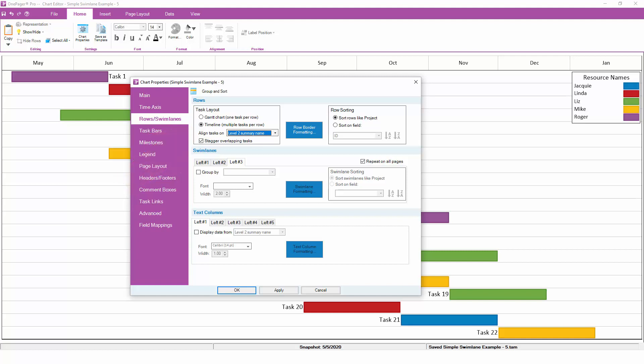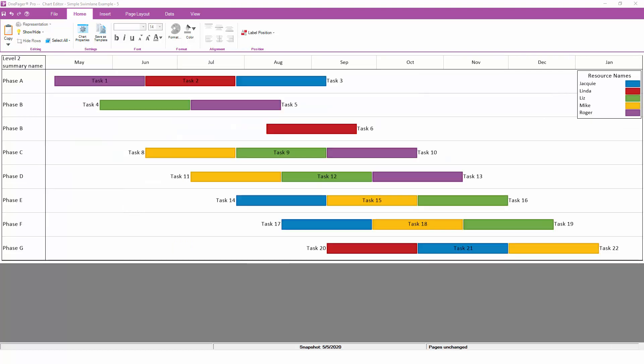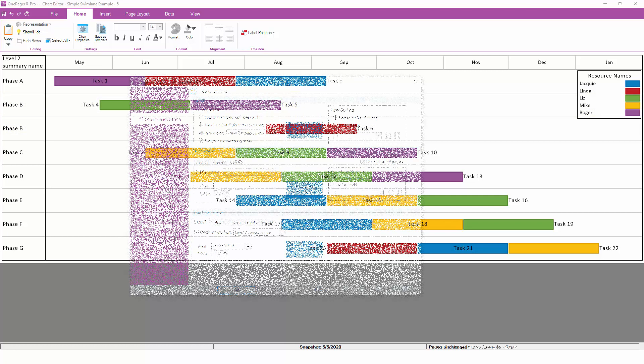We probably also want OnePager to display the parent task next to each timeline, and we can do that by turning on a text column to display the level 2 summary name for each row in the chart. With these settings in place, OnePager will automatically align any tasks that share the same level 2 parent task. Notice that the second timeline is not perfectly condensed down to only one row. This is because of overlap between some of the collected tasks.